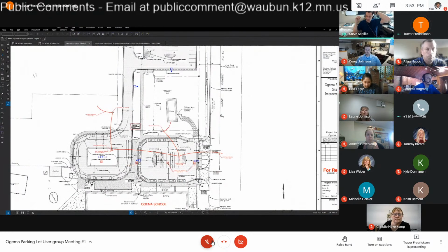Alan, getting back to your first question regarding the price of that turn lane, we have not put an estimate to that yet. It was a conversation that we just had this morning with MnDOT. So we'd have to get back to you with a number, an estimated construction cost for that. Okay. I would just say it would probably be needed just for the safety of everybody. Typically, you'll be looking at a 200-foot turn lane with about 180-foot taper. So you're probably looking at close to 400-foot total length along the highway there. Okay.